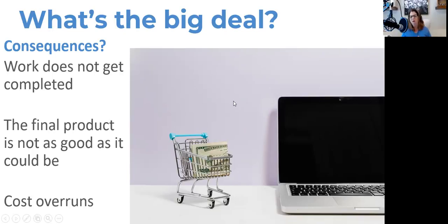The work is not going to get completed, perhaps. Maybe you rush, the product is not as good, and you're definitely going to run into cost overruns. So if you run your profit and loss, your estimated versus your actual for that project, you're probably going to be in the hole.